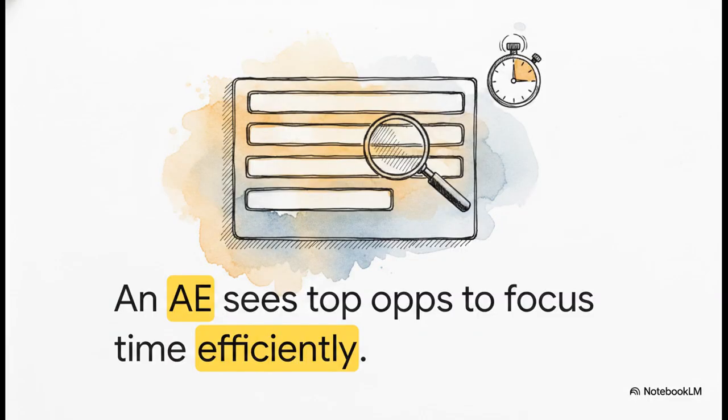And boom, look at what she comes up with. This results in a beautifully INVEST-tested story. The capability is small, it's highly testable, and it directly impacts the AE's observable behavior. Think about it. If the AE opens 3 of those 5 listed opportunities within the first 90 minutes of login, the test passes. That is truly airtight logic.